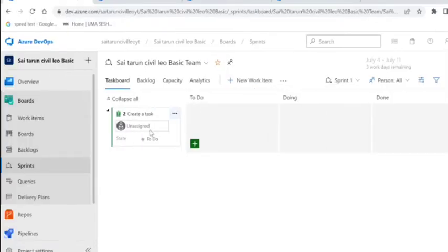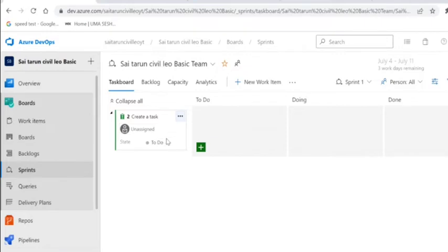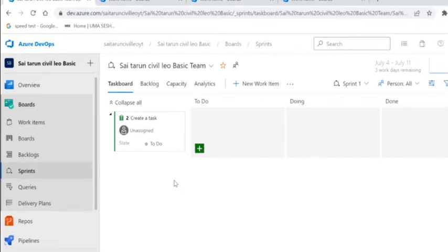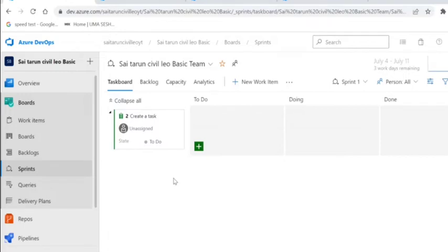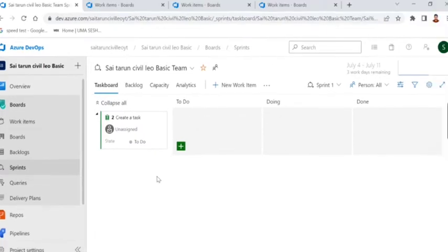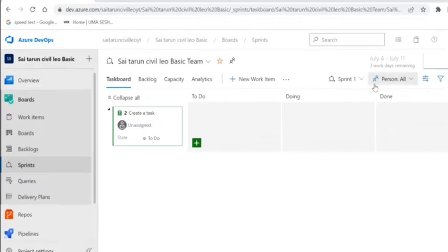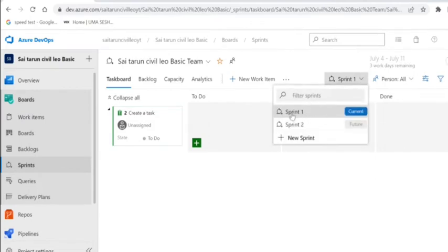Once the tasks are completed in sprints, every sprint has retrospective meetings, sprint retrospective meetings, to discuss all the work they have in the current sprint. Once a sprint is completed, it will move to the next sprint. Or if any work is left over in the first sprint, like 90% of the work completed and 10% remaining, the 10% is carried over to the next sprint, like after this 1 week is completed, that remaining 10% will be carried to the next sprint.